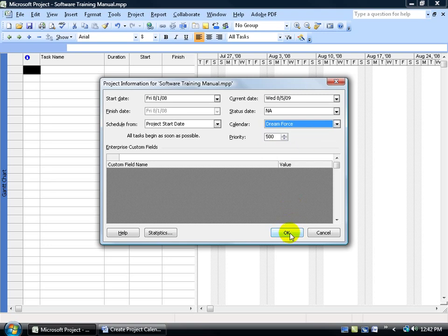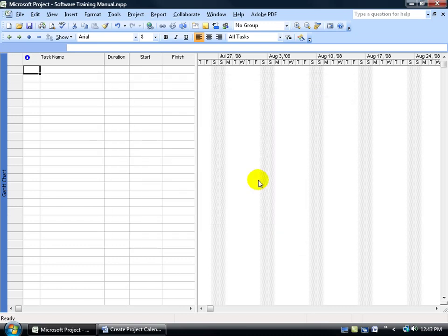For obvious reasons, if you don't set the right calendar to your project and click OK, you're going to be working off some other who knows what, different working times, which will screw up your stats, the project completion date, and everything else. It's a subtle change, but make sure that after you create and customize your calendar, you assign it to this project here and not leave it to the standard template.